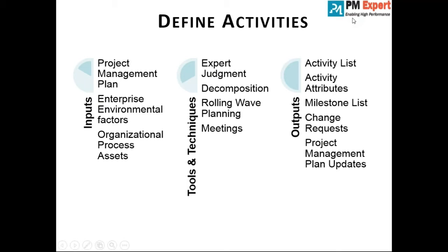I almost want to say I see that as planning the different phases, but I don't think that's right. No, see, I'm not saying ignoring anything. I'm saying plan the immediate future in a detailed manner. And the distant future is a future about which you know, but you are not very clear. So don't waste time detailing it out, but prepare a high level plan for it. As you go close to the distant future, you have better visibility on what to do next, so you can refine the plan. Every project has a planning horizon. The planning horizon is the immediate time frame till which you can see very, very clearly.